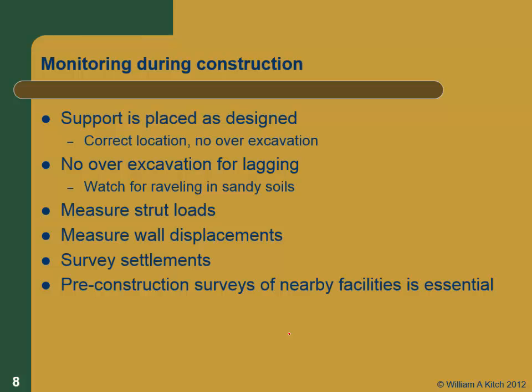But it's really important. If you're in a place where they have significant materials, significant structures and things outside, it is essential that you do pre-construction surveys of that stuff. Sidewalks, vertical buildings, if there's utilities, they'll often run cameras down. If there's large utilities, they'll run cameras down the utilities to document the condition beforehand, because in many cases, nobody's looked at them for 30 decades and they may be all crapped up already. So this is really, really important.